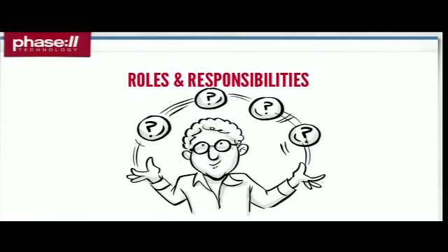Maybe later on it stirs this sort of sense of intra-team competitiveness or backstabbing or something like that, which can really endanger the project. So ensuring that those roles and responsibilities are defined and actually written down in the project charter up front helps cut through a lot of that tension between those people.